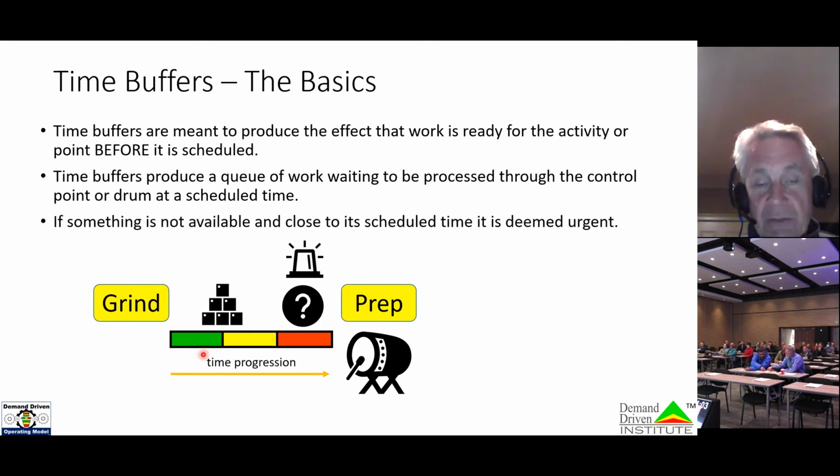It also provides critically, just the same as DDMRP buffers, prioritization and visibility. And I can't emphasize enough how critical this is from an execution standpoint. We have a concept called a buffer board in the software that allows us to monitor the inbound work orders that are coming towards this drum position. And there's two layers in the buffer board. The upper layer is the yet to be received.